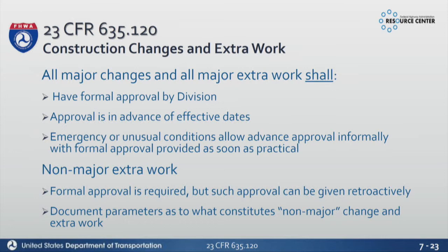We're saying that you're assuming the approval of that on our behalf, but you can approve the major change, but you still have to get authorization from Federal Highway through the FEMAS agreement before you incur costs, and that's on major changes. For non-major work, that's a little bit less formal. We do have to eventually have formal approval, but we can do it retroactively.